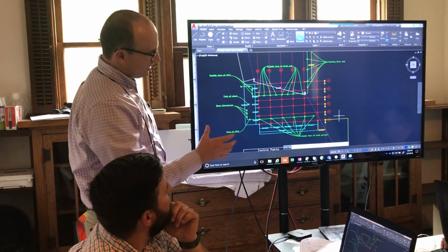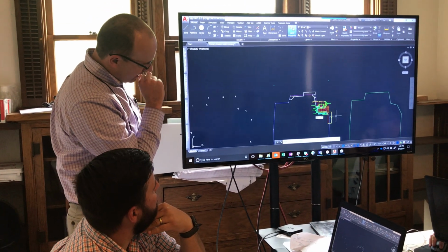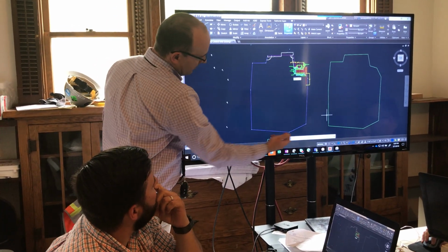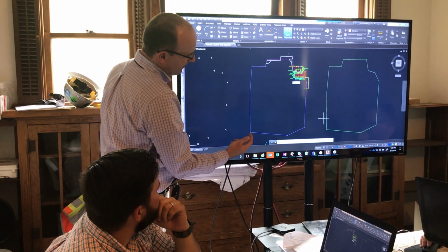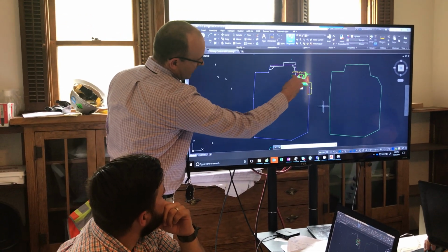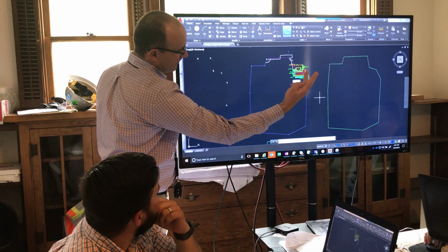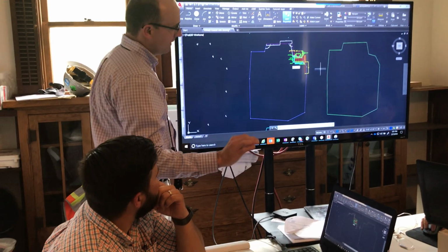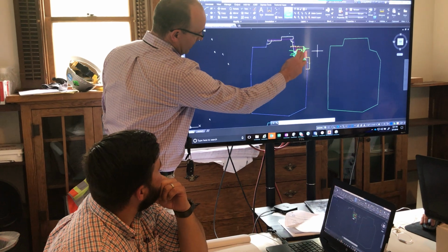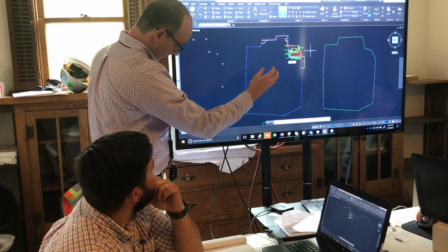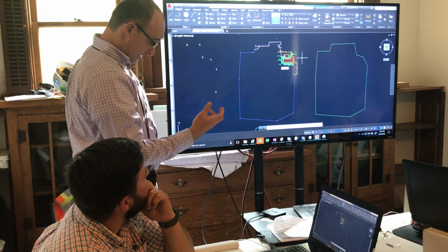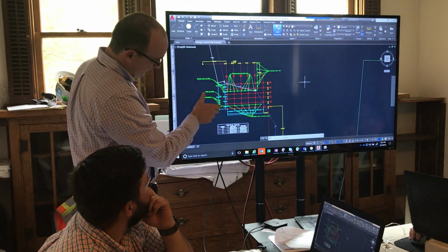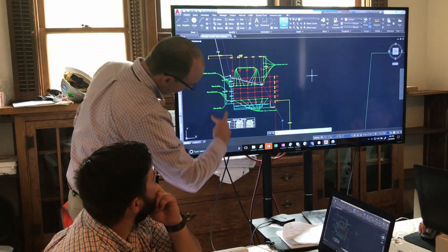And so, just to summarize everything, if you can zoom out, Jake, we took the design benchmark and the X and Y of all the surveyors' points, traversed them, and then we took as-built locations of the tie-in building, X, Y, and Z, confirmed that the building is in fact where the designers wanted it to go and that those points were right, and then Jake enabled his team to go put control points out there to reduce or eliminate fee erosion from mistakes and from not having a precise network of control.